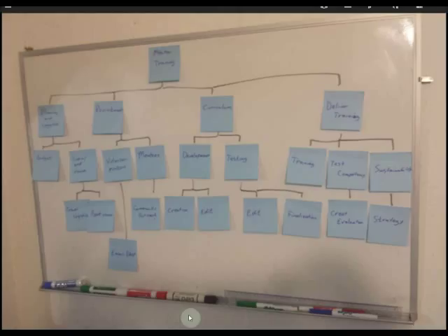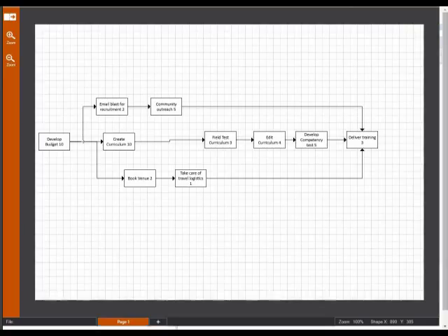In this example, I've taken a picture of my mentorship training project WBS that I developed while at the workshop. Then I use a simple software called Flowdia to begin my network diagram of the key activities just as I had learned. You can also use the network diagram you developed during the training with sticky notes. Notice here that though my WBS is a decomposed hierarchy, in other words, breaking large tasks into actionable tasks, only the lower level activities are really needed for the network diagram. However, those higher level activities will show up again once I begin developing my schedule.